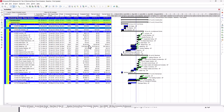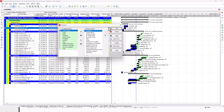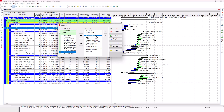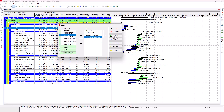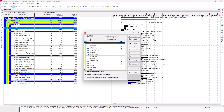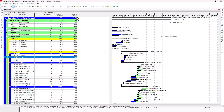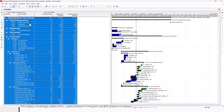Here is our schedule — this one we imported last time and we created all these columns. Now I'm going to remove some columns I don't want and keep only the relevant ones. I'll keep Activity ID, Activity Name, and Duration. No need for planned start, planned finish, start, or finish. I'll keep Schedule Percentage Completed and Performance Percentage Completed, and remove everything else. Now I have this small schedule. I'll make sure no filters are applied by choosing all activities. Then I'll click here and press Ctrl+A to select everything, then right-click and copy.